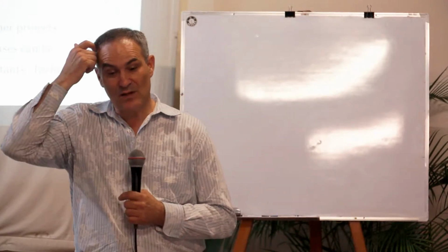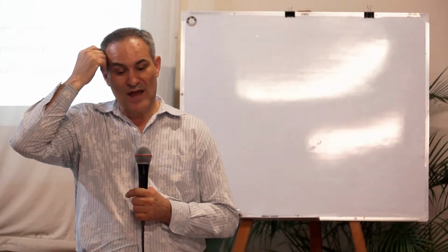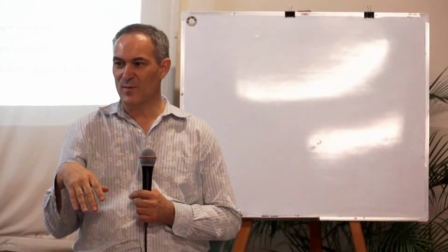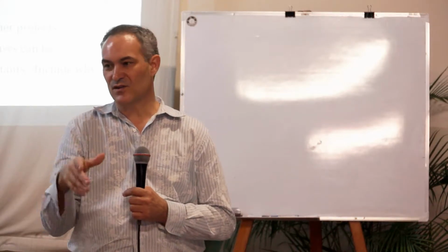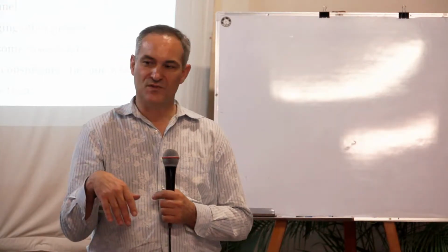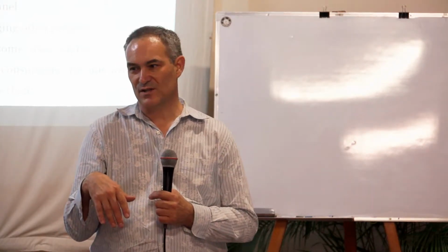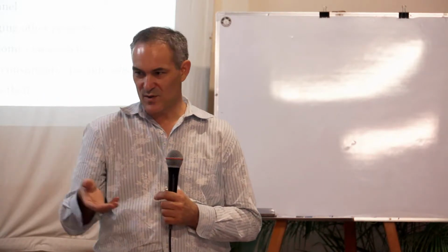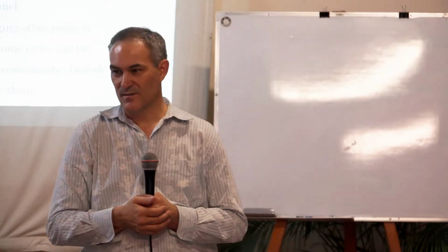But it is difficult, and I'll give an example. The project that I'm working on now in Ethiopia is funded by the U.S. government. The project has a gender requirement that women are included, and we're supposed to have half the people working on the project be women. So we had to go out and survey 32 different teacher colleges, spread across the whole country. In some cases, you have to fly to get there. Other cases, it's an 8 to 12-hour car ride just to get to one of the schools.